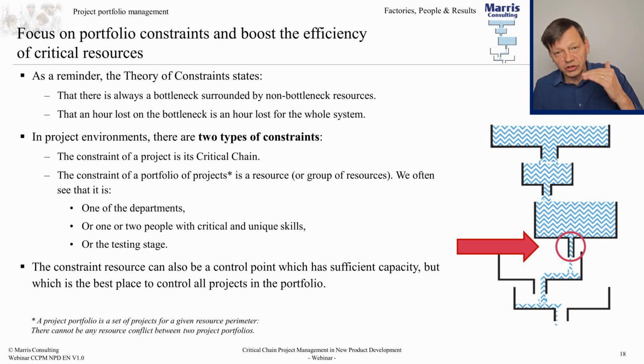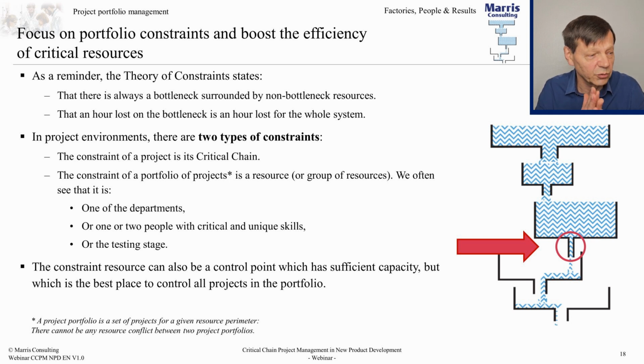The other thing is, strangely, and it's violent in quite a few businesses, watch out, testing, the final stage, testing will be the bottleneck. It happens often, much too often. Why much too often? Because it is the worst possible place in the system to have a bottleneck. It means there's piles of work in progress everywhere, but nothing is coming out because it can't be tested. So that's one final point.